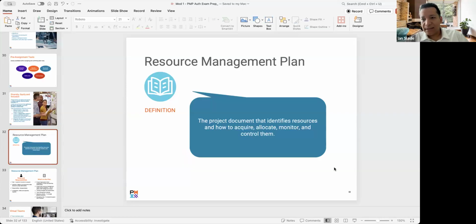All the resources have tasks, while not all of the stakeholders have tasks. So if there's a task assigned, they're your resource. I have a question. Is this similar to the RACI chart that you showed us previously? Very good question. So the RACI chart determines